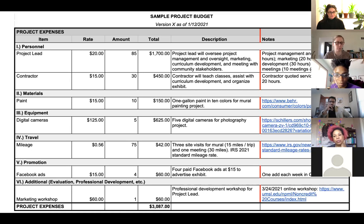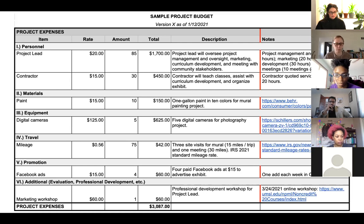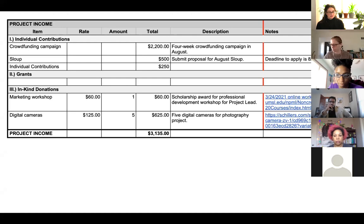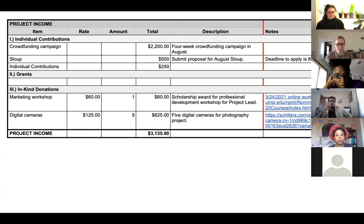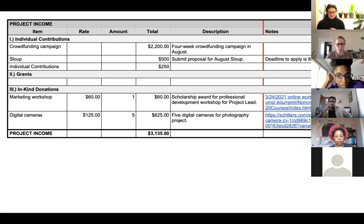The next part is project income. It has the same columns: item, rate, amount, total, description, and notes. What's really important here are the different rows — individual contributions, grants, and in-kind donations. You want your project income to be equal to or more than your project expenses, because you should have a balanced budget. For me, the most important things about the budget are the notes and keeping it up to date — going back to that version and date, even though it seems like a very small thing.